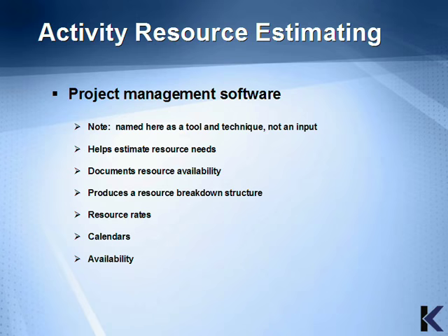It's important to note here that project management software is named as a tool and is not an input to the process. It helps to estimate resource needs and documents resource availability. It also helps the project manager produce a resource breakdown structure. You can include resource rates in this software, as well as calendars and resource availability.